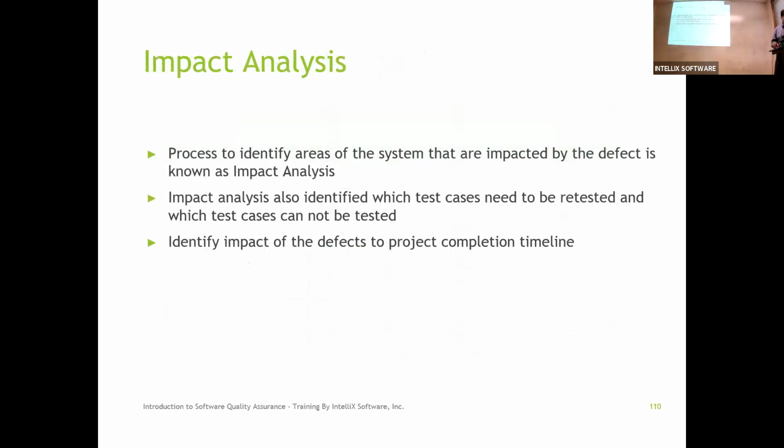Once you identify the defect, you have to do the impact analysis. Right? So it's not just good to say, hey, there is a problem. Like, well, what is the impact of the problem? Okay. So you have to do analysis, right? And the analysis contains how long it's going to take you to fix it. How many tests you have to re-execute, right?